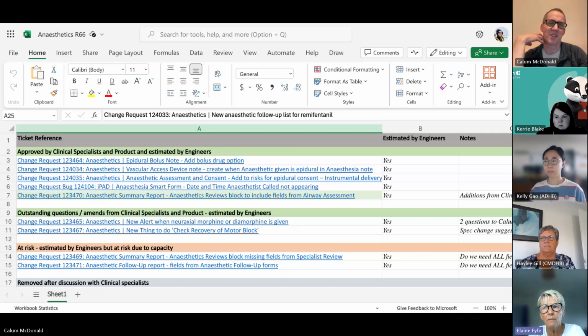The other thing is, when change requests are reviewed, they go through a review process with the project manager, who's Tanya, and they don't only go to the engineers, they also go to the testing team. So the hours estimated per change request combine everything: how long it's going to take to review, engineer and test it. Some things are going to take 5 hours, some things are going to take an hour. So there's also fitting everything together within a release, it's like a jigsaw, really.